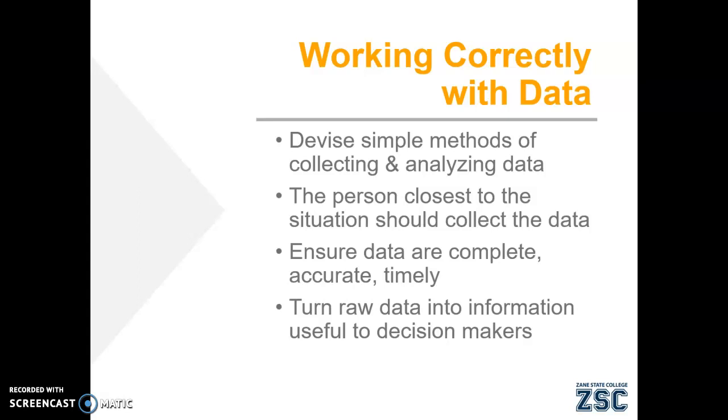The second bullet point here is something I strongly agree with, and that is a person closest to the situation should be the one collecting the data. So that person is going to know the process the best. They're going to understand the data the best. They're going to understand what data is relevant.